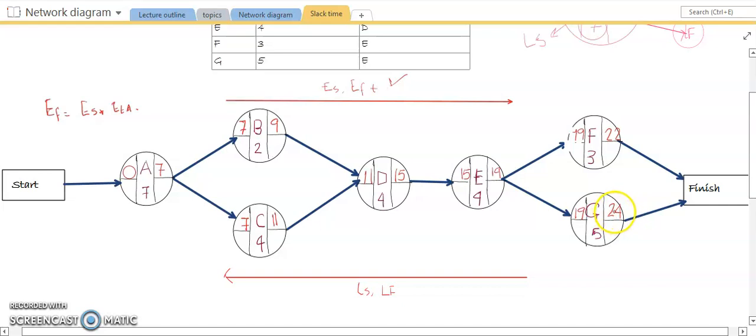We will be taking the time which is the maximum time of the project. If we do not take the maximum time, then the minimum time will be allocated, which will not match the overall time of our project, which will mislead the calculation. So we are going to take the maximum number, which is 24. So here 24 is taken as the latest finish time.